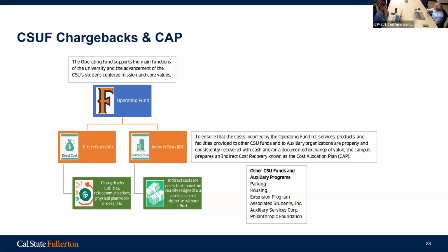Not only that, in order for a project to be viable, they have to be able to show that the debt service, meaning the bond that they sold, the interest and the payment of principal, they generate enough income to pay for that additional debt service. So we have to look at those too.